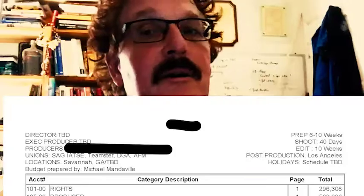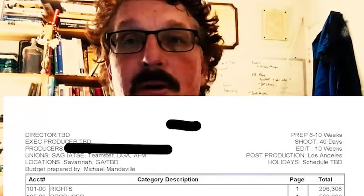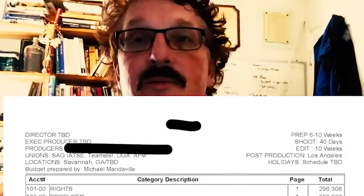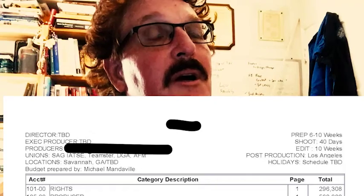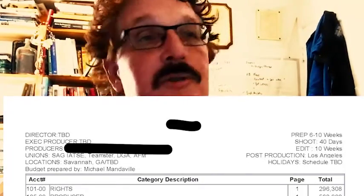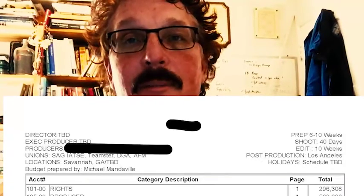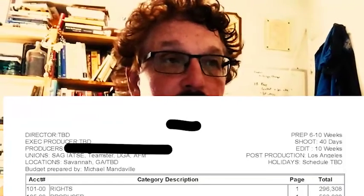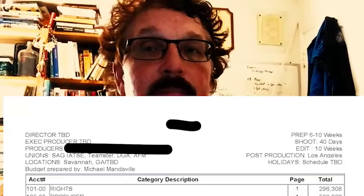First we have the header, which includes things like who the director and the producers are, but also important information like which unions you're dealing with. In this case, we have the Screen Actors Guild, the IATSE — which is the Craft and Technicians Union — Teamsters, who are drivers, the Directors Guild of America, and the AFM, the American Federation of Musicians, which is used when you have a band appear on a film.